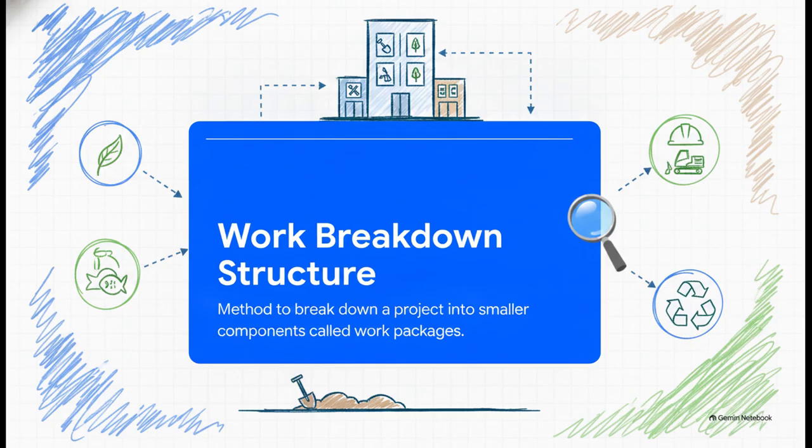So you might pull out a work package specifically for site excavation and ask, okay, what are the specific environmental obligations like dust control for this exact package? Doing this helps you pinpoint potential impacts way before a single shovel even hits the dirt.